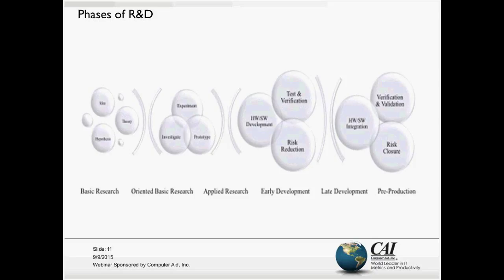The earlier in the development phase an activity is, the less is really known about how to accomplish the change that is desired, and the later in the development phase, the closer it is to implementation readiness. This is the representation of that progression, and although there's a linearity shown in the figure, the progression of R&D is really not linear. For example, an activity may start in applied research and move into early development, or a basic research activity may begin and end within that category without ever moving into the next. It's also possible to start in basic research, move all the way into late development, and then loop back into an earlier phase if an experiment or prototype does not perform as planned. There's a relative synergistic relationship where results drive the progression.